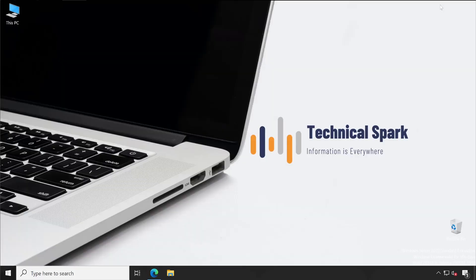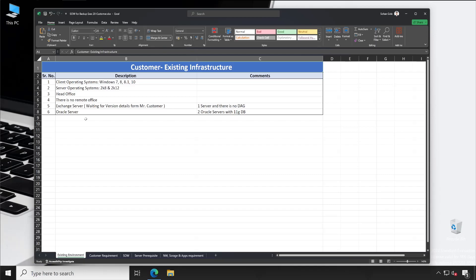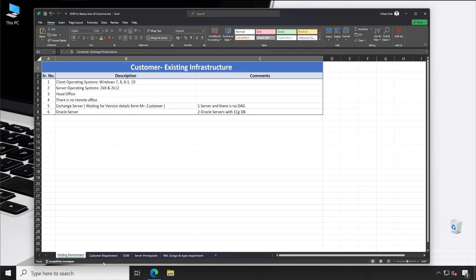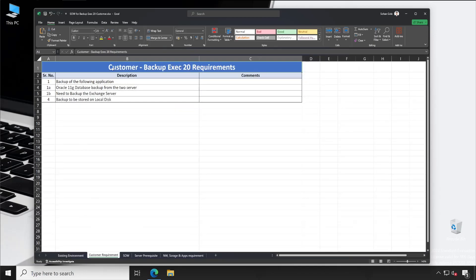Now let's come to the actual point. This is quite an old document because in the latest one I have mentioned all the customer details and cannot show it. But for your reference I'm showing the older document. You can mention the customer name, and the sheet should be called 'Existing Environment.' You gather details like client OS, server OS, how many offices they have, remote offices, applications present, and then ask the customer what exactly they want to backup — for example, Oracle databases and how many are present.